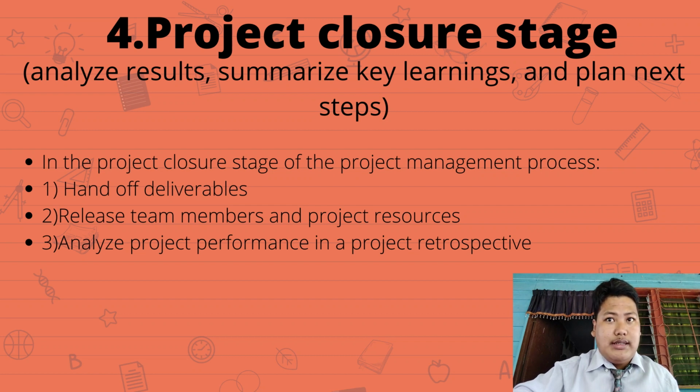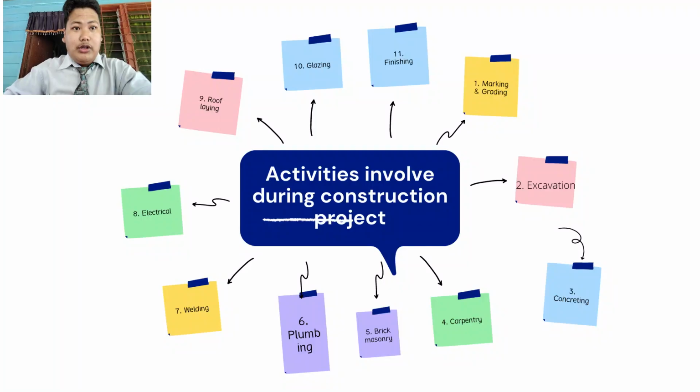In the project closure stage, the manager should hand off deliverables, release team members and project resources, and analyze project performance in a project retrospective. A project retrospective is as much about reviewing the success of the project as it is about extracting learnings that can apply to future projects. Projects will never go without obstacles, and there will always be things to learn that will ease the progress of other projects. Now let's move on to the next content, which is activities involved during a construction project.